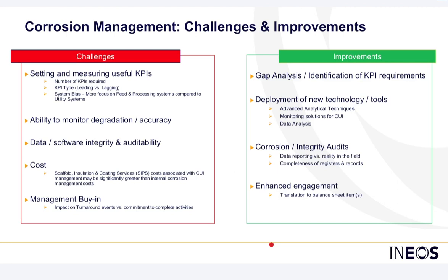So one way to do this is to conduct a gap analysis to see what specific needs the asset will require. You can do this very early on, perhaps at the design stage, and complete it just before commissioning. I've done that for a number of projects.